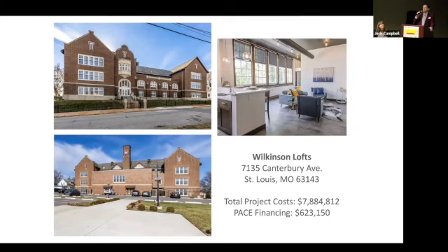So one of the concerns when you're doing the audits for historic projects is there's certain things we can't do. Those are incredibly inefficient windows, and they're single pane. We can't replace them for 5 years. The National Park Service does not allow it. So you do have to get a bit creative. And there are certain things, like we couldn't put solar panels on the roof if they're seen from the street.